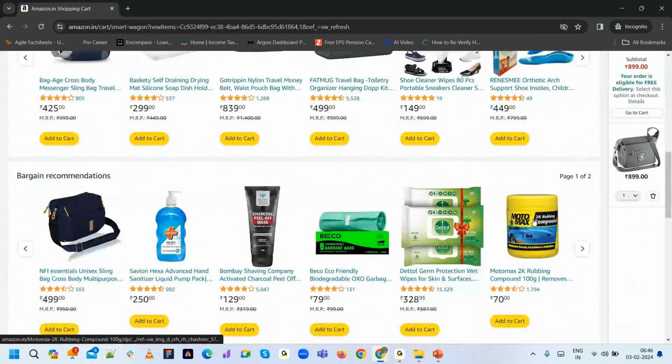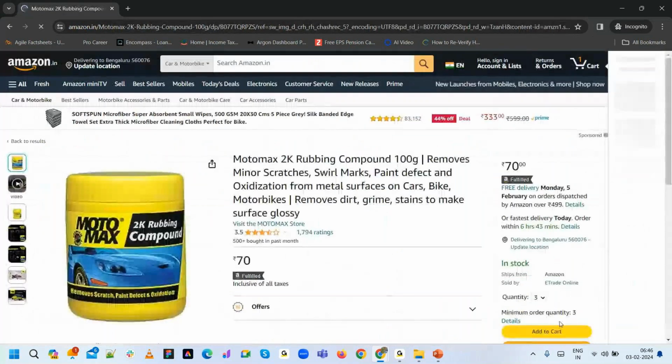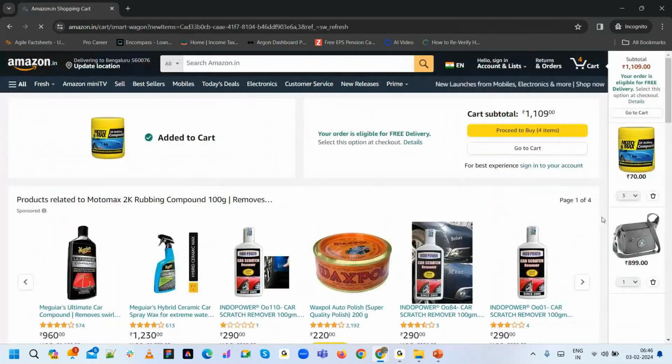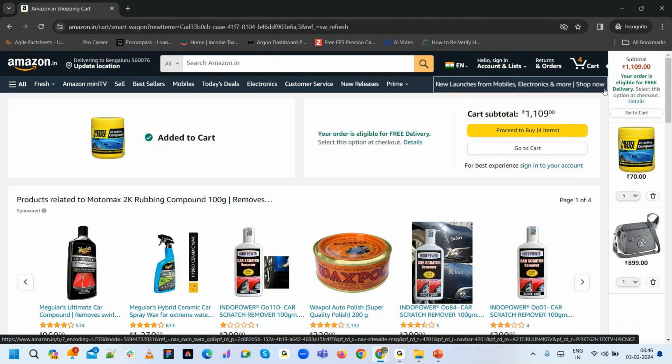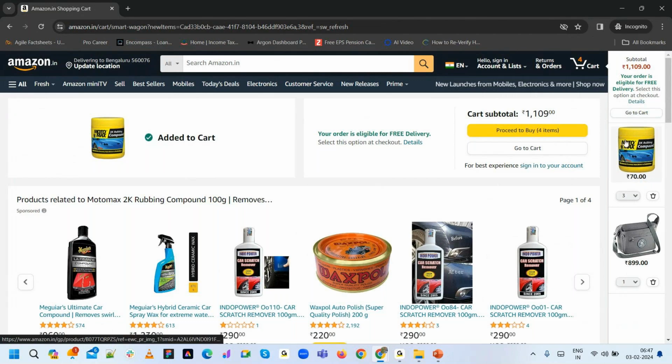So some motor bags, rubbing compound is there. I'll say this. So these are all things getting added, right? So if the epic is shopping cart, what are all the stories? There should be a facility to add items to the shopping cart. There should be facilities to delete items from the shopping cart, correct? Go back and check out. There should be, yeah, checkout is a different thing. Checkout is a different epic. Shopping cart is related to shopping cart. So there is a right splitter showing up, correct?